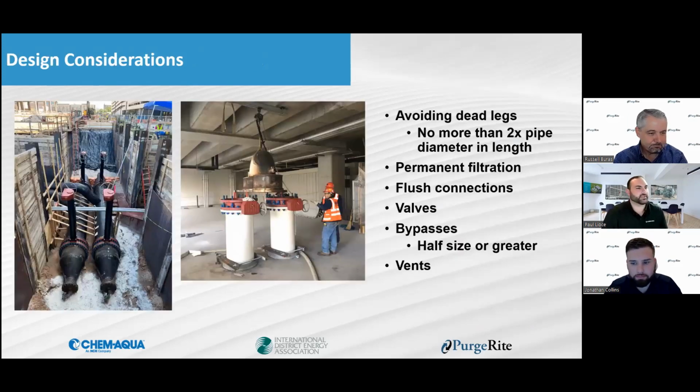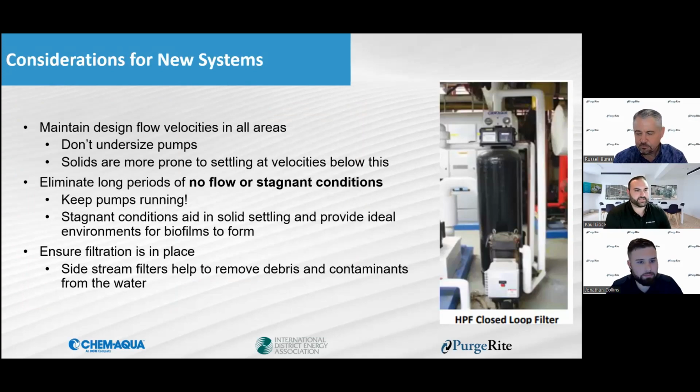Yeah, Russ, if I can go a little bit on that one. Give yourself realistic timelines, right? As a water treatment provider, I'll sometimes get a call on Thursday, and they say, hey, Monday we're starting this. And it's like, well, I'm sure the building didn't get completed in a day. Having those timelines to get plans in place means it's not just thrown together, because that's where a lot of times we see shortcuts get taken, right?